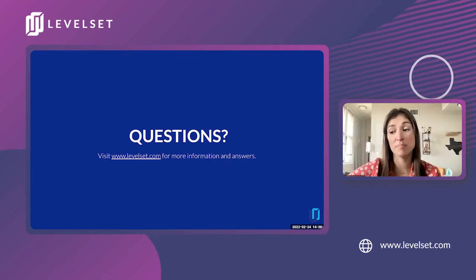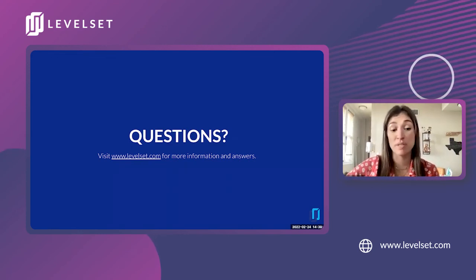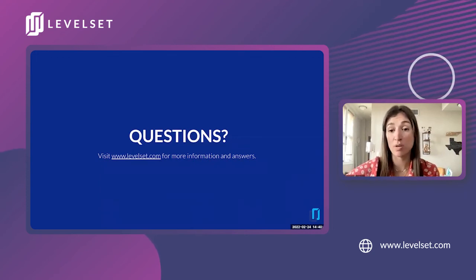I know maybe a little bit more from my experience in a past life when I used to practice law. That information more than likely came from the HOA, but for preserving your mechanics lien rights and sending proper notices, it's all going to be about who the state requires that initial preliminary notice to go to, and most often it is the homeowner, general contractor, sometimes construction lender. I can't think off the top of my head of a specific instance where I've seen the HOA be required for notice.